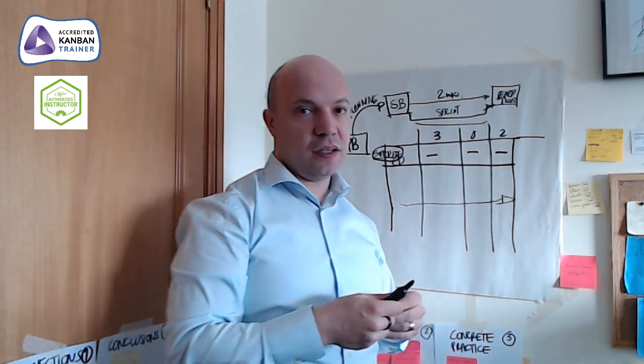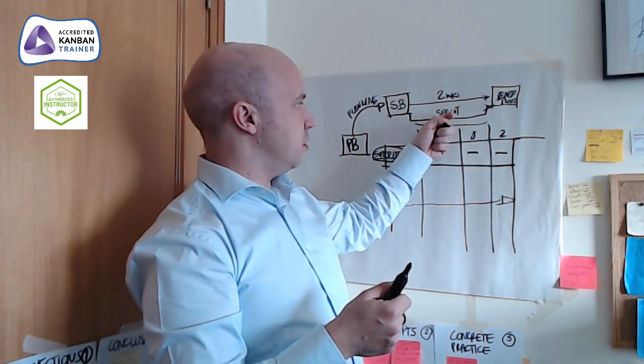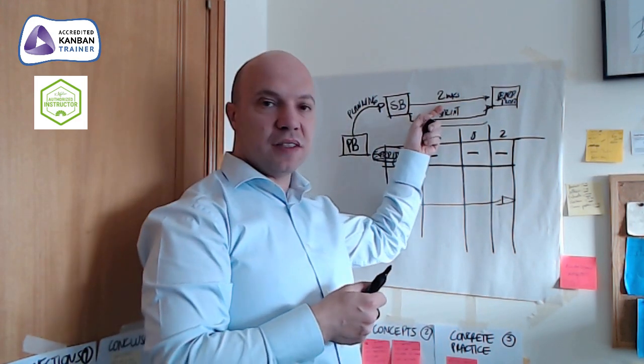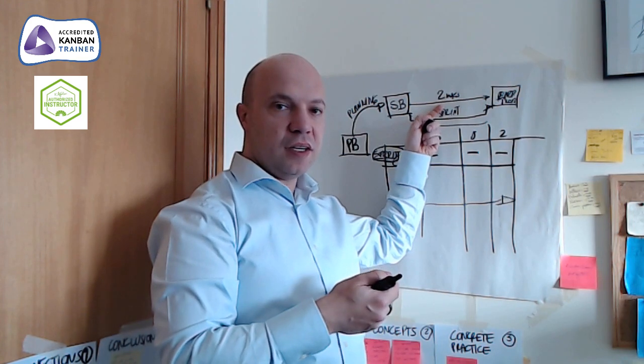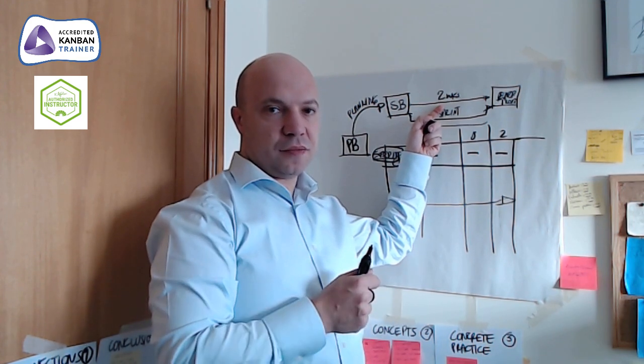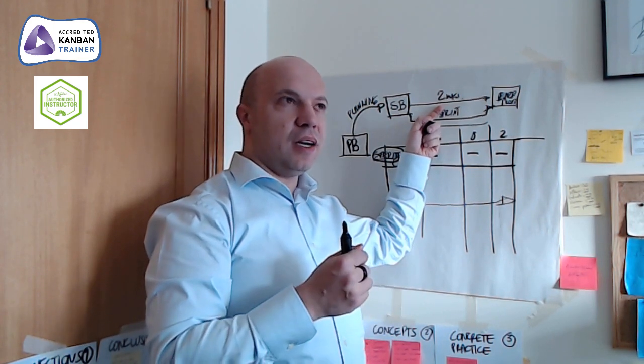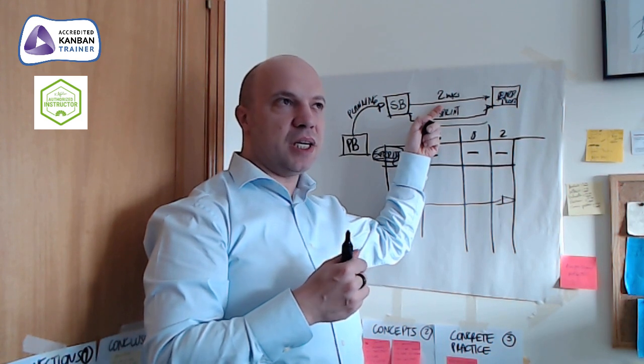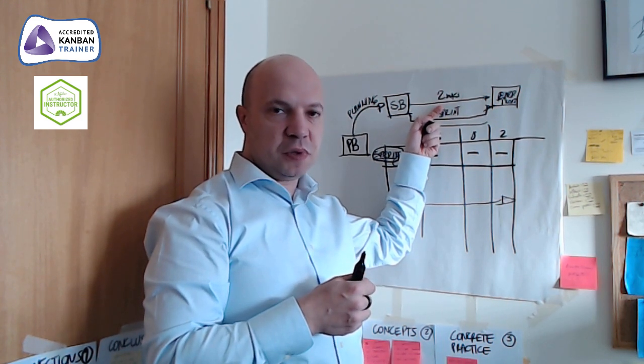urgent. In Scrum, we don't have that, right? So anything that would change the content of the sprint will disturb the sprint. So this is, I would say, the biggest difference between one and another.